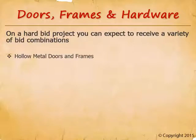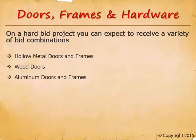You may get bids for hollow metal doors and frames combined, or individual bids for each separately. You might get bids for pre-finished wood doors versus those requiring field finishing by the painter. Separate bids for aluminum doors and frames are common, as are separate bids for door hardware. You might receive a bid for hollow metal that includes hardware but wood doors that don't. You will receive bids with any combination of these items.